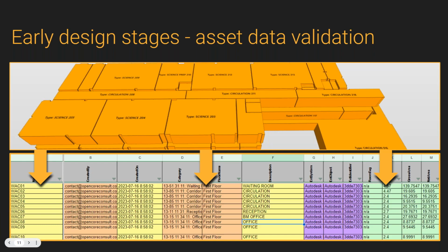Now, I've only usually done that when there's been a requirement, usually from a customer representative, and that's proving assurances, essentially. That is proving that project milestones that have been established are being met. We're not just filling models with COBie data in a mad rush just before handover. That never happens. So yeah, just checking asset data. You may have other requirements besides COBie. I'll get onto a couple of them later on, and you do need to check them.